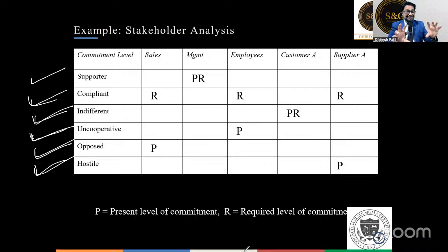Now, again, the stakeholder analysis is not static. This is just like the score of a cricket match. It goes up and down. Sometimes wickets go up, sometimes the score goes up. Similarly, that's what we suggest: stakeholder analysis should be done phase-wise. If a lot of people are not supporting, then you can escalate it to the management.